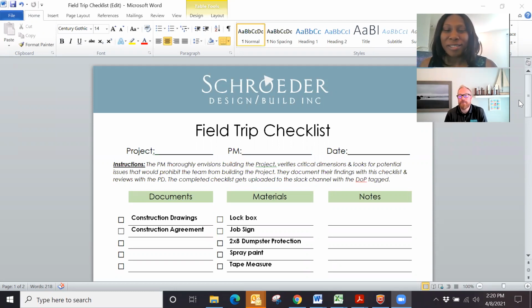So today is our training, recorded training for the field trip. Exciting stuff. Yep, pack your brown paper bag lunch. This typically is done by the project manager, and it happens for the most part prior to the production packet meeting. It gives the project manager an opportunity to visit the site, look at the conditions, and then bring any areas of concern or any additional notes that the team will need to know to the production packet meeting while we're preparing for the actual job start.